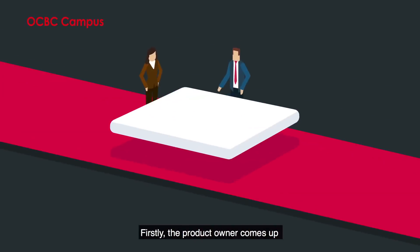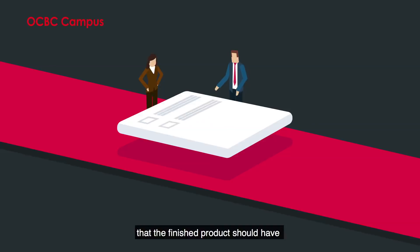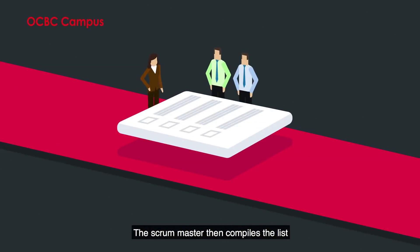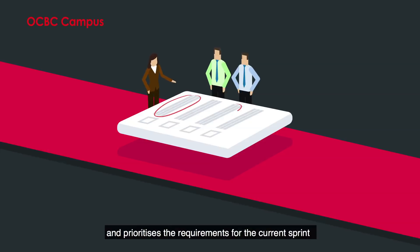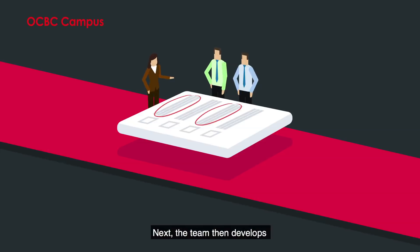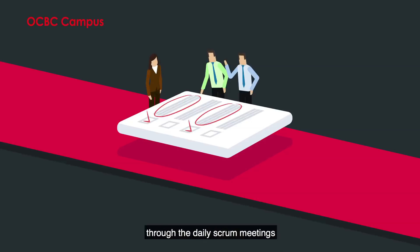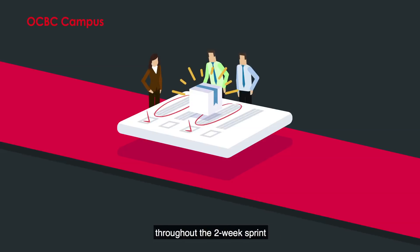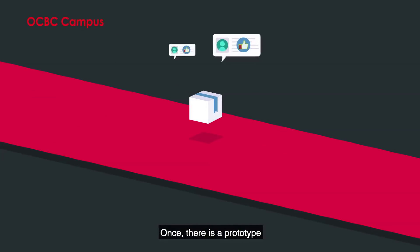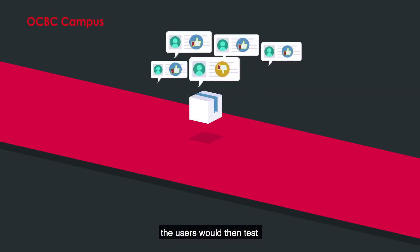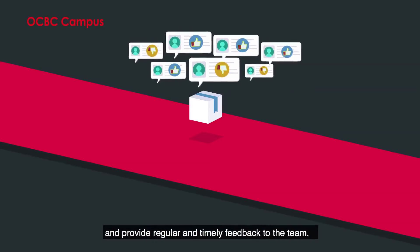Firstly, the Product Owner comes up with a list of requirements that the finished product should have. The Scrum Master then compiles the list and prioritizes the requirements for the current sprint. Next, the team develops a workable version of the product based on the prioritized requirements. The work progress is further managed through daily Scrum meetings throughout the two-week sprint. Once there is a prototype, the users would test the current iteration of the product and provide regular and timely feedback to the team.